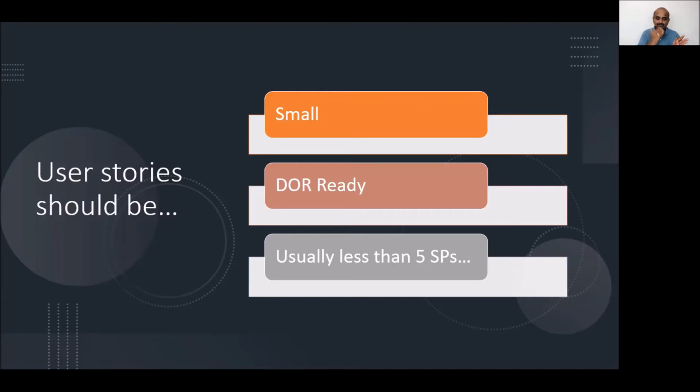that means you can follow the INVEST principle. The story should be independent. The story should be small. The story should be negotiable. The story should be verifiable. The story should have proper acceptance criteria. The story should have proper estimation, or it should be split. It should fit within this particular sprint, right? So likewise, I'm telling you, the definition of ready is arrived at by a team, and it is a checklist of items a story should comply with. Then only should the team take that story into a sprint.